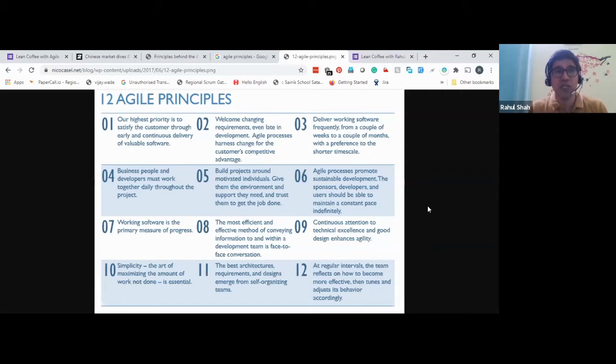So what we did was a classification. Those defects were reported by whom, how many customers, what is the support contract with them, how much money we are getting annually in support contracts, and other such factors. And for all the rest of the defects, we said that we won't be fixing them. So around 1,500 plus defects, we said we are not fixing them.